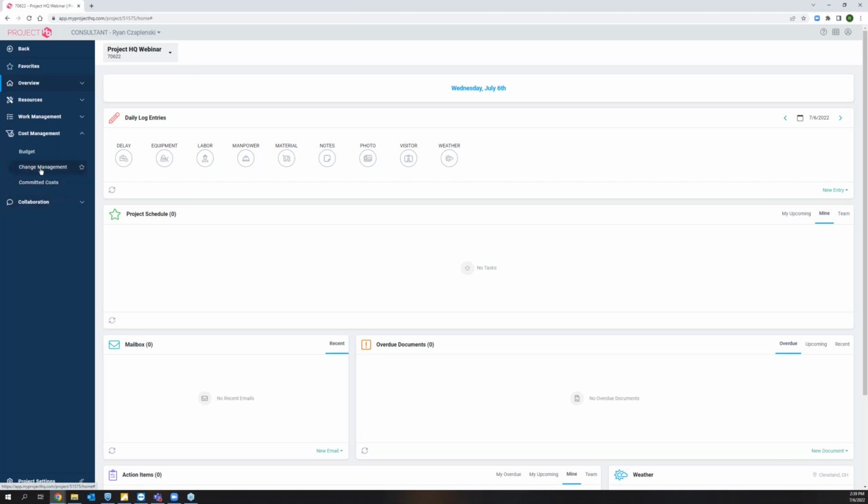And then the 2 things that push into the Foundation accounting system, purchase orders and change orders, those exist here under cost management. So a good rule of thumb, there isn't any documentation that shows this, but cost management is the Foundation stuff. It's the budget that pulls from Foundation. It's the change orders we'll push into Foundation. It's the POs, subcontracts, and vendor change orders that we'll create here and then eventually push into Foundation.